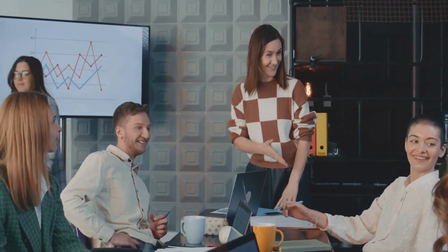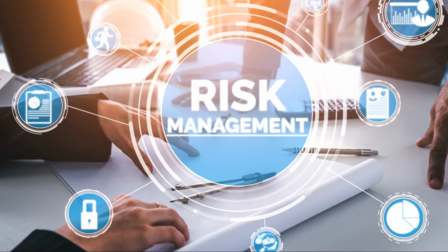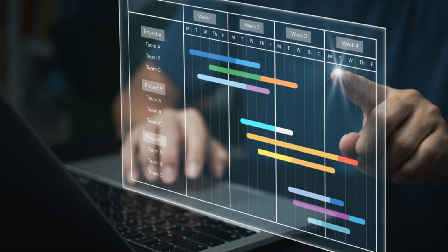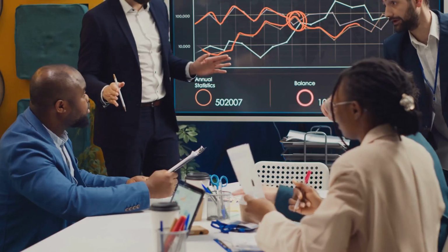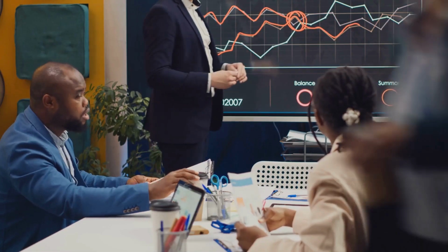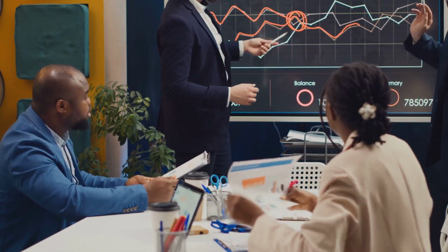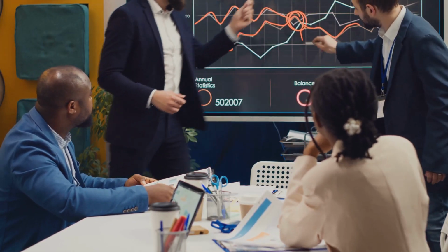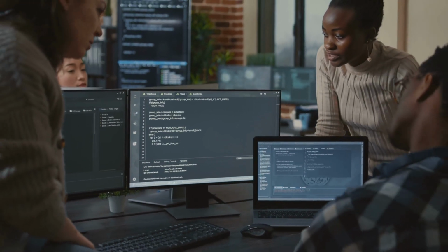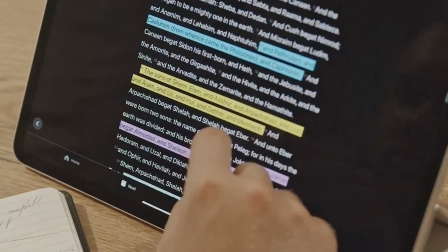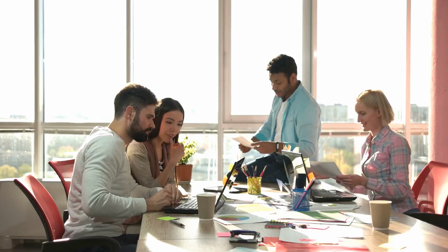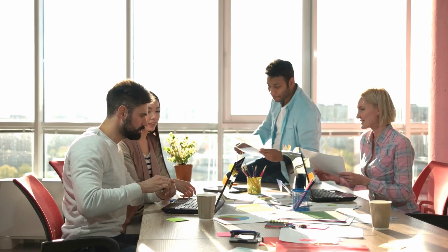Another important aspect is risk management. Every change brings potential risks such as increased cost, extended timelines, or added complexity. By linking CRs to the RTM, project teams can evaluate how much risk is introduced by a new requirement and prepare mitigation strategies. For example, if a CR introduces a dependency on a third-party API, the RTM highlights where it will affect testing and functionality, allowing the team to assess reliability concerns.